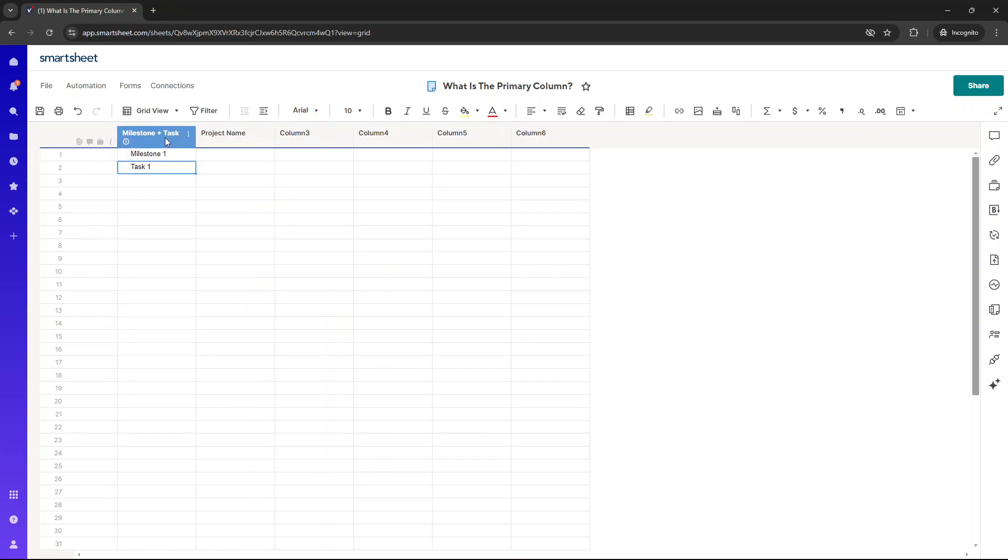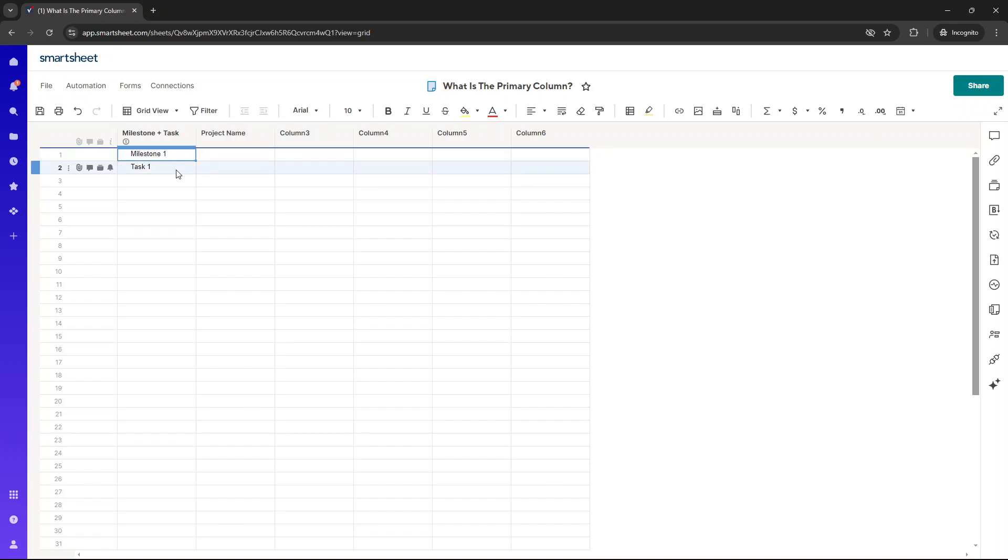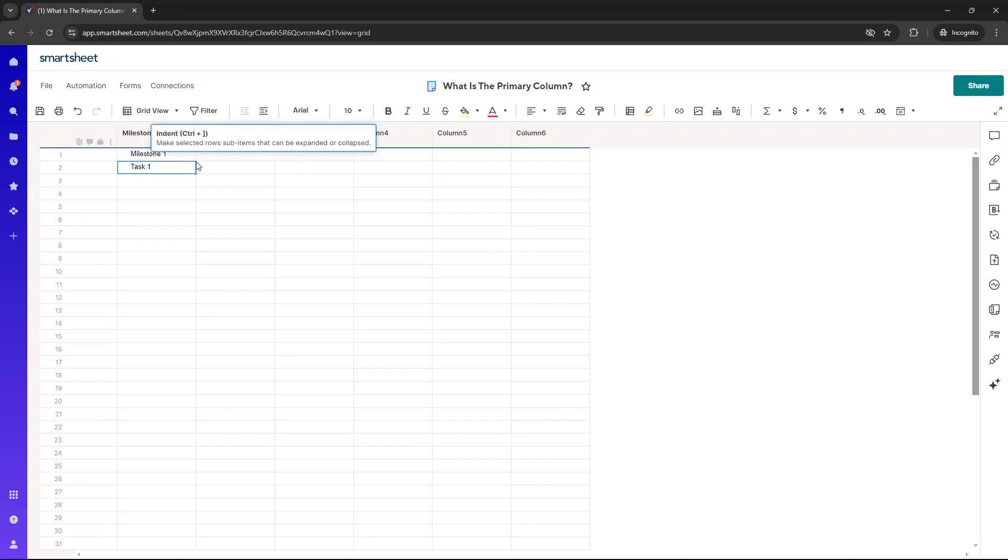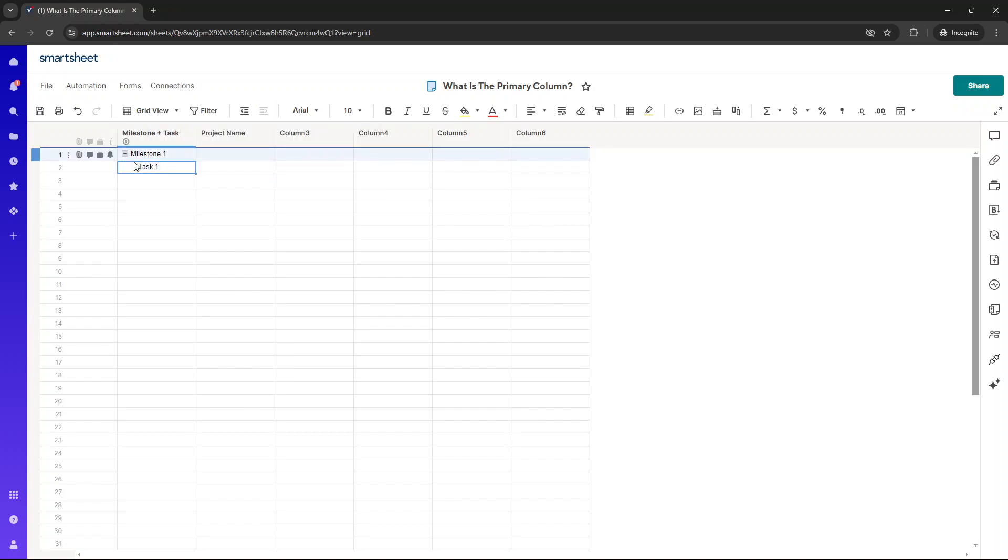Now, the beauty of the primary column is that we can leverage the hierarchy features of Smartsheet. And what I mean by this is we can set up relationships between different data points. So as an example, I want task one to roll up into milestone one. So I'm going to select this particular cell and click indent. And you'll notice that has set up the relationship. So we can indent and outdent and we can roll up information under milestone one, as an example.